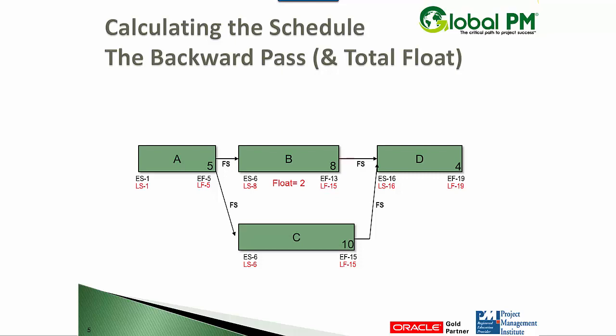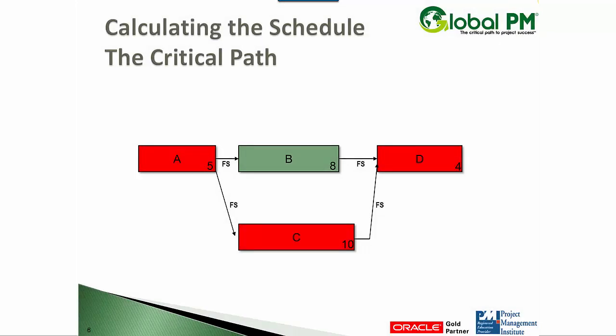The activities with zero float are critical, zero or negative. Here we can see the float shown on the back end. And here's your critical path.